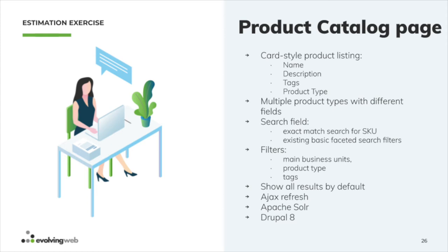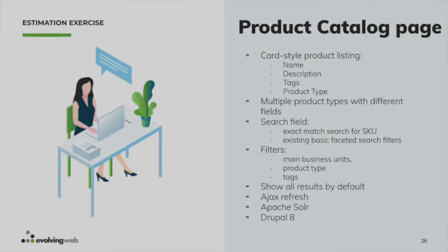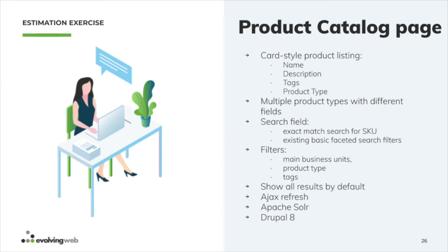So we're just going to give you maybe 1 minute, since most of you have experience with this, to give us an estimate, a range for front-end development and back-end development. And you can use the tables to discuss among yourselves. Okay, so basically, we spent 28 hours front end and 75 back end for that. It doesn't include PM, QA, design, or UX, just the straight up development work. So the total that we logged in our system was 105.